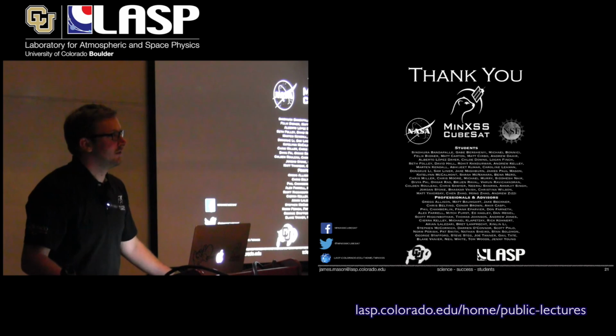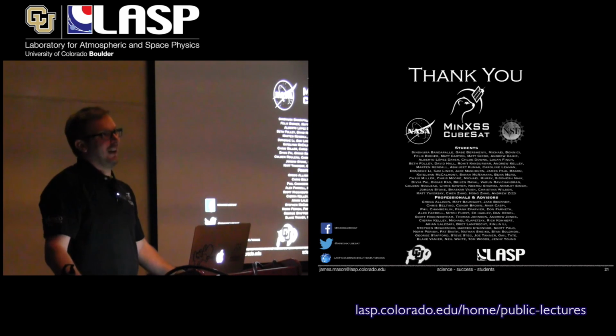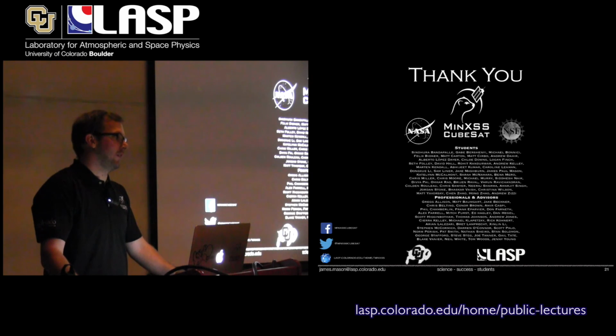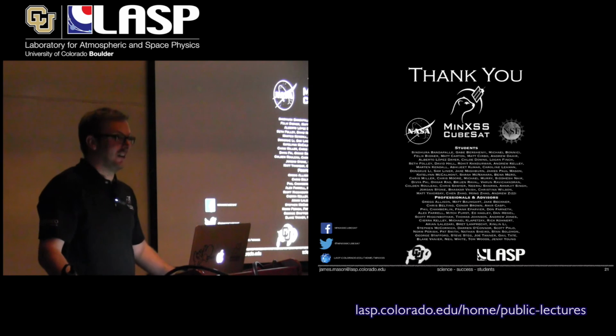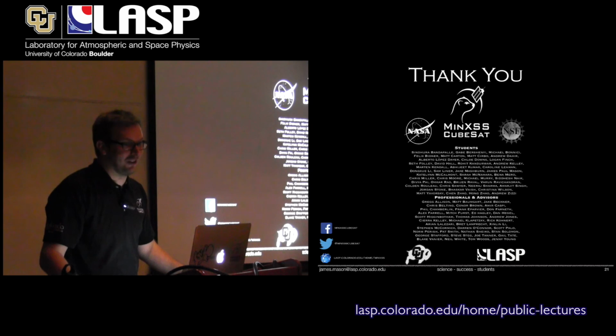The environmental testing that you did, I didn't see that you did any acoustic testing. No. Vibe was loud, but it was not acoustic testing. That is something else we could have done. We just don't have the facilities here, and I'm not aware of any nearby that we could have used for cheap or free. The nice thing about our current CubeSats that are running now is we've gotten a lot of that testing for free, like the anechoic chamber testing and vibe testing. Because the total budget for this whole MinXSS thing was only $1 million, we had to find places we could tolerate risk, and that was one of them.